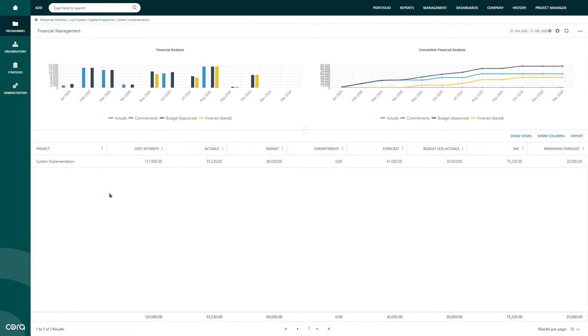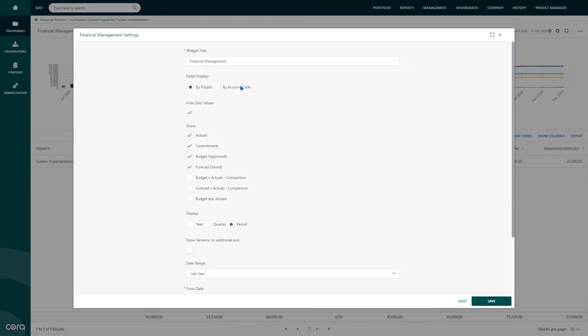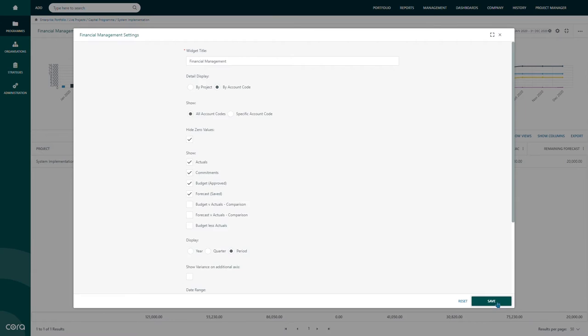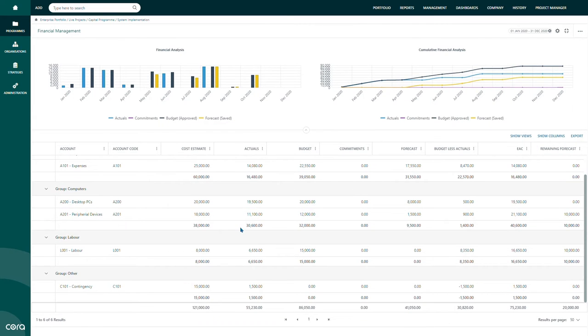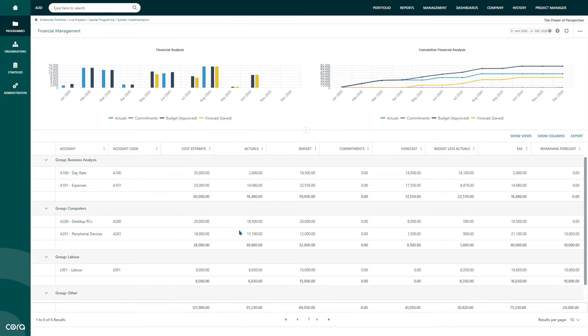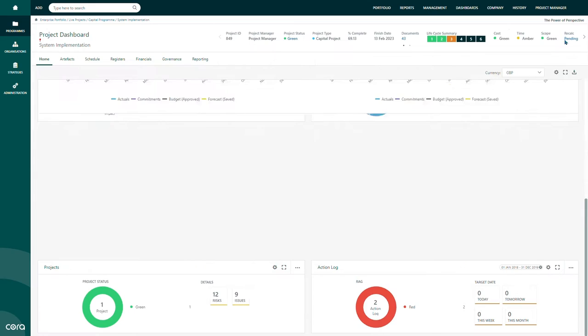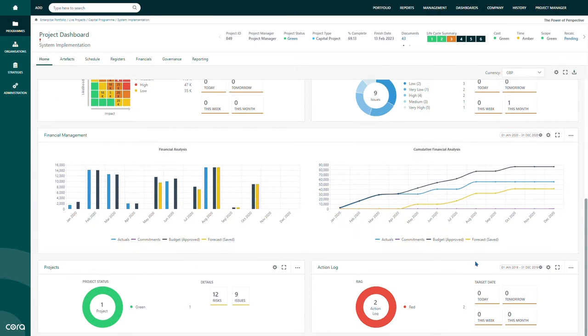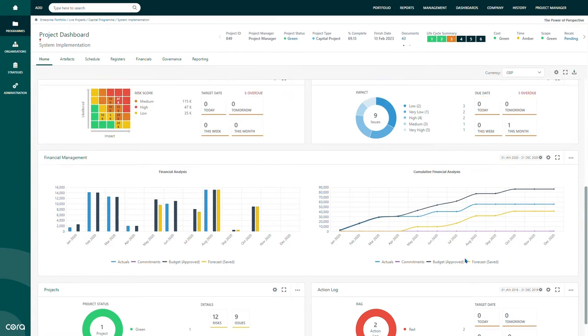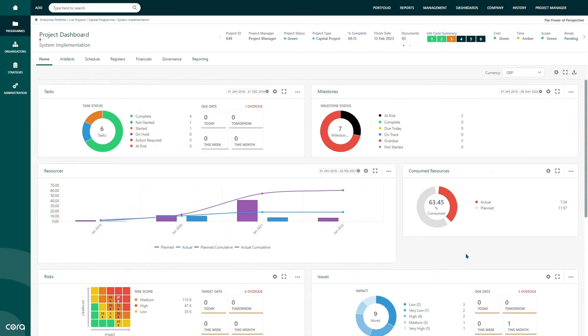Cora can also integrate with third-party financial tools via an API, providing you with a consolidated view of your portfolio's health. For organizations with advanced financial needs, Cora Systems provides a cost book functionality that enables the capture of POs, invoices, and change orders against various account codes.